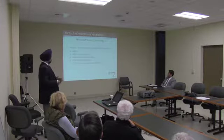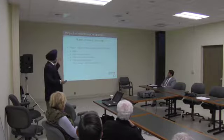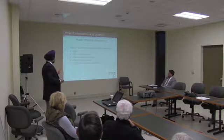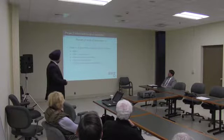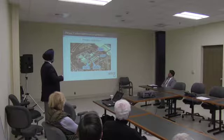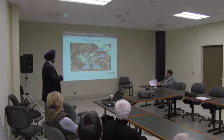So then comes phase four. The area that we cleared up in phase three, demolishing the clarifier, we'll put other processes in the plant. For example, we'll put the new filters, the liquid oxygen and ozone generation building, chlorine contact basin, and CO2 storage. So this is how it will look when phase four is completed. So we'll have new filters, a new chlorine contact basin, and we'll have a new ozone building and chemical system installed.